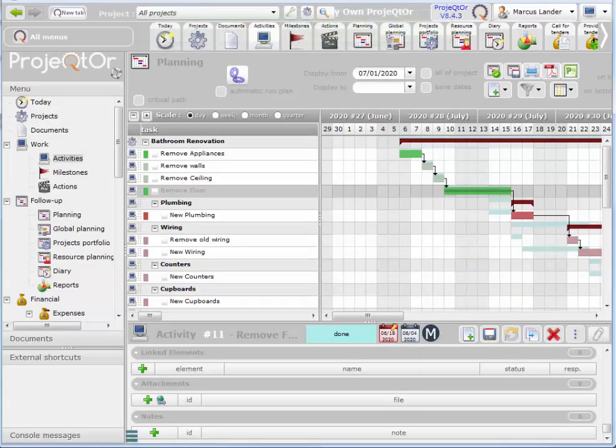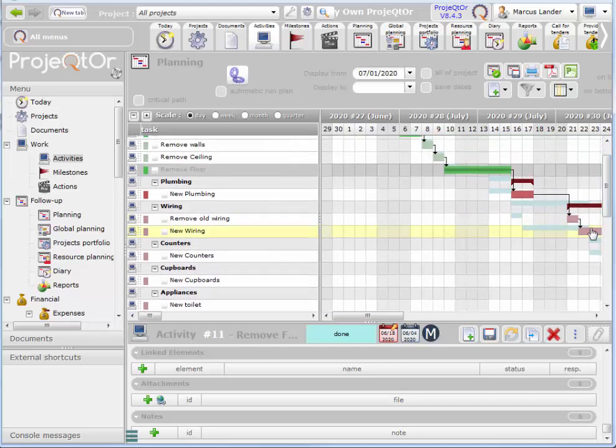Now notice that all of the linked tasks have been pushed down because we changed all of the dates and the duration for that task. And notice we have this pale blue baseline. So it shows us that we're delayed somewhat from our planning. So that's what the baseline is for. Basically, you can enter the real work in your actual task once you've set up your baseline, and then you'll be able to see where you are in relation to your planning.